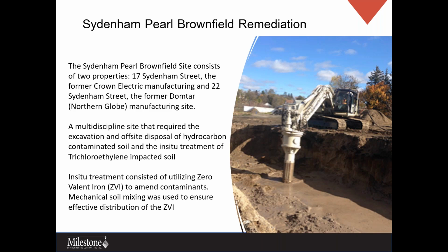Phase 2 of this project, the remediation, took about 8 weeks to complete and included removal of underground storage tanks, excavation and off-site disposal of petroleum hydrocarbons and soil, and in situ soil mixing to break down volatile organic compounds in soil and groundwater via abiotic reduction. The soil mixing strategy employed at the site is designed to ensure adequate distribution of the zero-valent iron within the soils while minimizing the creation of odors and preventing off-site adverse impacts to those neighboring residential properties.